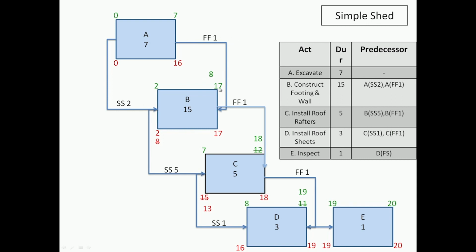So obviously 17 controls. So I am not again going through the details of this, but let us see how do we then represent and analyze this. You will find that once we do the analysis, the critical aspects are: one, this start relationship, so start of A becomes critical, the start of B becomes critical, end of B is critical, finish of A is not critical, start of C is not critical, start of D is not critical, but end of C and end of D become critical, and the start and end of E become critical.